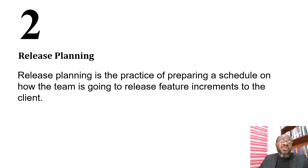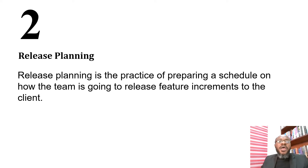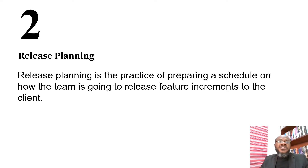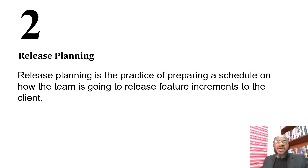For some scrum projects, the team may decide to release after every sprint. Other teams may decide to combine one, two, or three sprints before releasing to the client. Much of that is informed by how the client wants value to be delivered. On Kanban projects that are feature-driven, releases are done on a need basis. The client communicates how they want features to increment through the product owner, who then ensures releases are done by that rhythm.